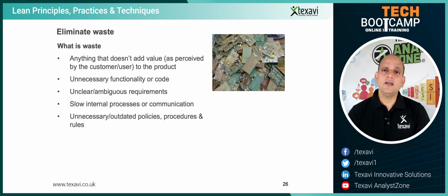And that's one of the reasons why, as I think I mentioned before, the Standish Group report, which did research on why IT projects fail, came up with a report you can actually see on the internet. It says that about 78% of IT projects fail because of one thing, and that is requirements. Requirements not stated properly, not specified properly, requirements changed, scope creep, whatever it could be, it has to do with requirements. Therefore, you should be very, very careful with how you're developing, managing, and delivering on requirements.